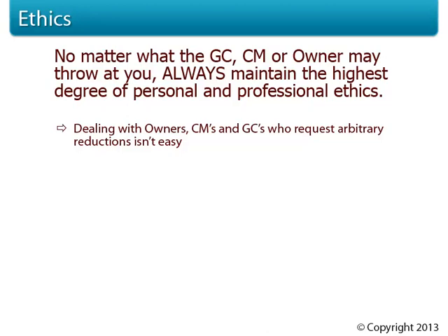The best advice I can give is to keep your cool and request specific details from the person asking for the unreasonable reductions. For instance, when a construction manager says, "It just looks too high," calmly ask, "What portion appears too high, and why?" Since you've provided a detailed pricing breakdown and substantial backup to state your case when you initially submitted the change order request, as we discussed for the first 90% of this course, they should be able to provide specific questions. Logic will prevail.